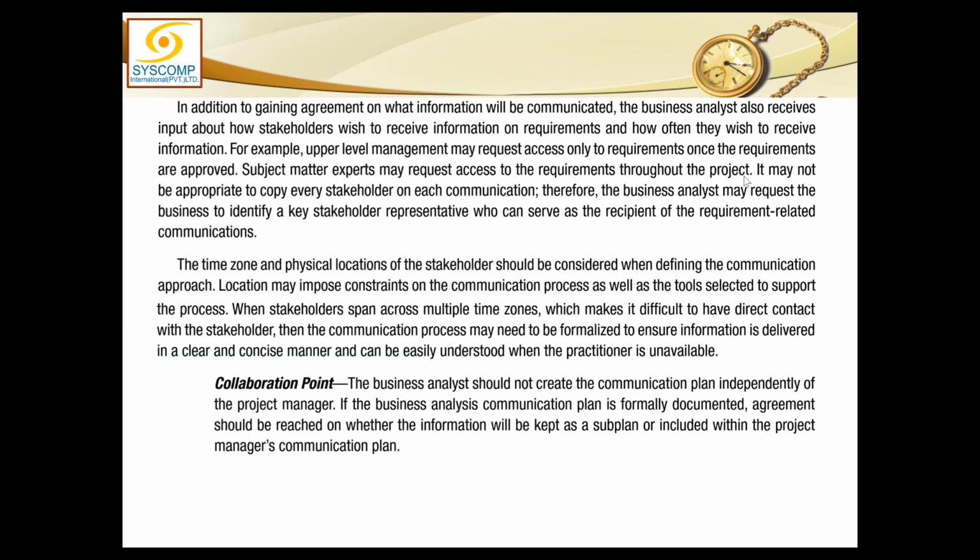So different stakeholders will have different requirements and you need to understand those. It may not be appropriate to copy every stakeholder on each communication. That is a very uneconomical way of communicating, sending one communication report to everybody. Therefore, the business analyst may request the business to identify a key stakeholder representative who can serve as the recipient of the requirement related communications.